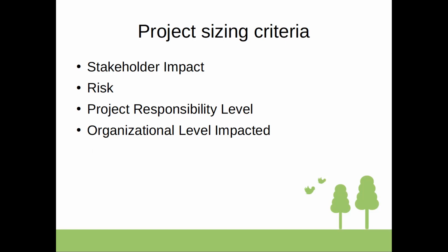Definitely. Quite often people forget that the project manager is also a resource, and the time they spend is an essential cost of this project. If there's, let's say, a project manager that handles 5-10 projects in a working day, it's one thing.